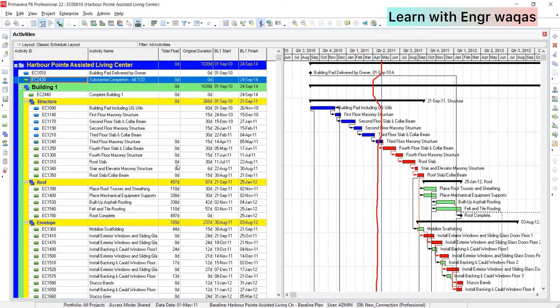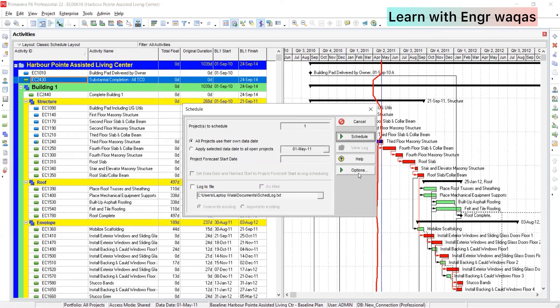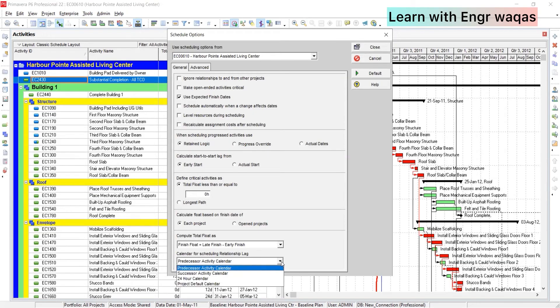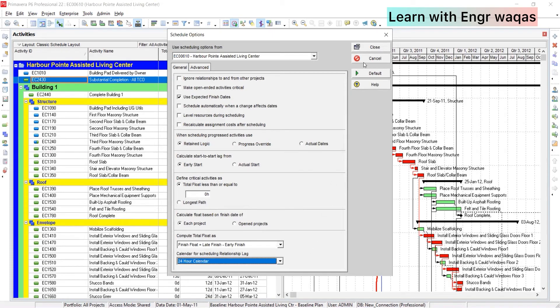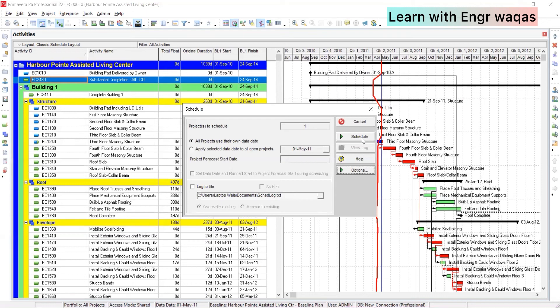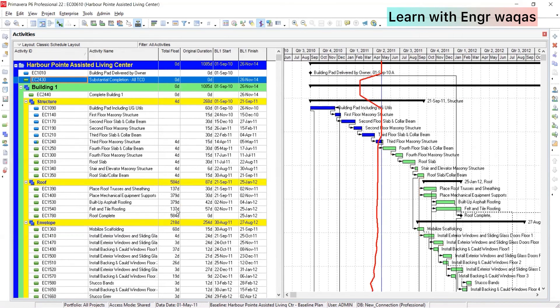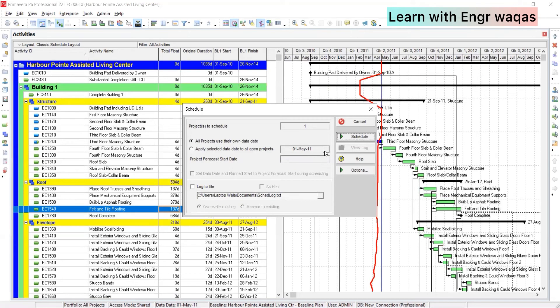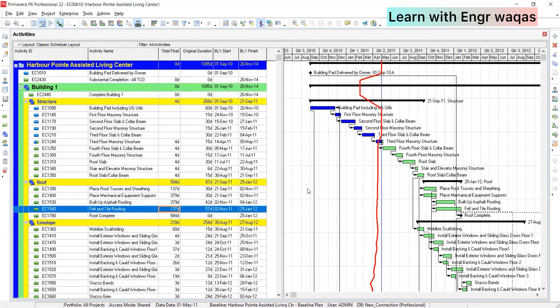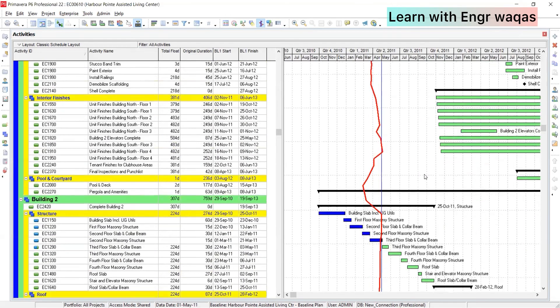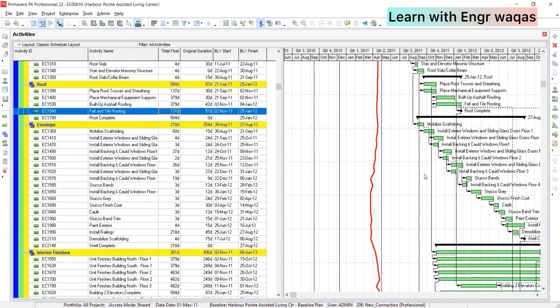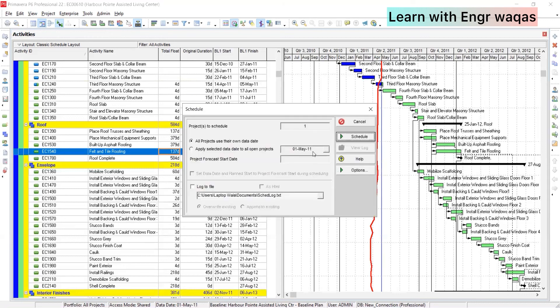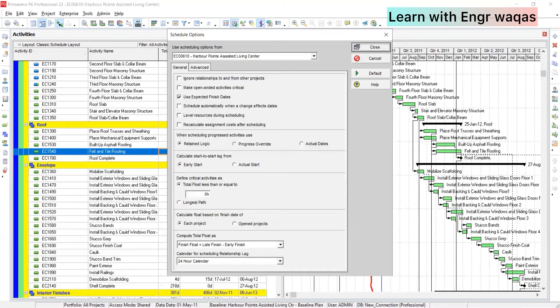So what I'm going to tell you people right now, that you have to go into schedule and go into the options, and here you can just change your one thing - your calendar. You can see sometime it can happen. I can apply 24 hour calendar and close. Yes, and schedule, and you can see, you can observe before there was 110 days of float. So now it's going to enhance 137. So this is one of thing that you can change your calendar - maybe mistakenly you are not following the same calendar, and the second most important thing I am going to suggest what you need to do. See, it has changed, your everything is vanished, red color critical activities are vanished. Why? Because it's not the right thing to have that calendar over here, see.